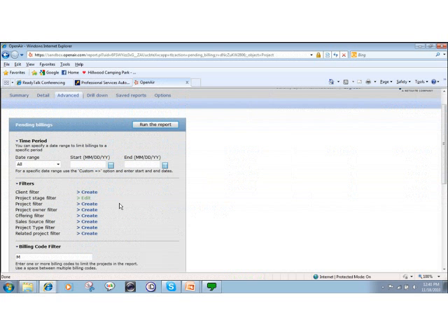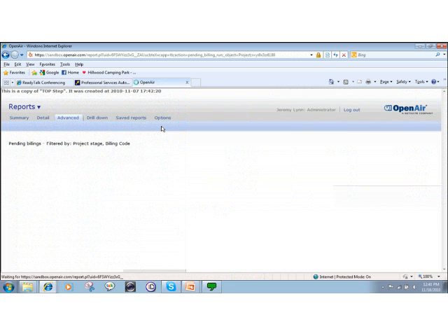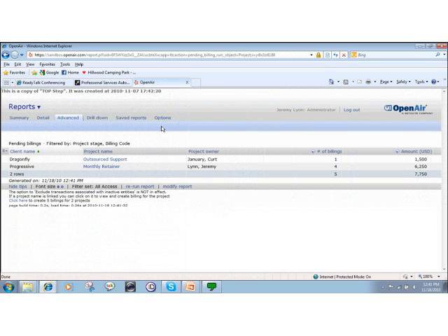So now what happens when I run this report? You'll notice that I had 2 projects on that report that were tagged as monthly. So now when I run this, without changing anything else, simply by applying the billing code, I've only paid attention to those 2 report projects because those were the 2 that I needed to generate invoices for. And then I would proceed on with my normal activities, create the charges, create the invoices, and I've done my monthly billing, so to speak.